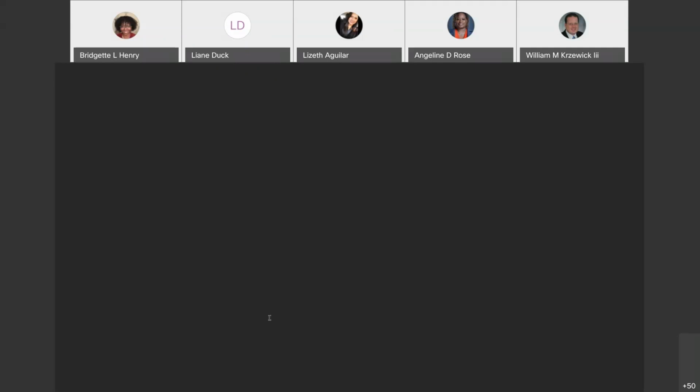Coordinate the changes across the knowledge area. Document the change request in a change control system. Update the project plan to reflect changes. Bring the information to the stakeholders for evaluation and approval. What action should you take first? Option 2. Yeah, document that bad boy. Okay, and that is the correct answer.